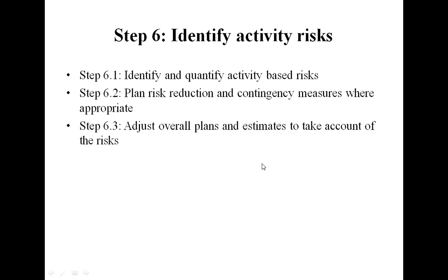Step 6, identify activity risk. So here, first, identify and quantify activity-based risk. Here, the damage if the risk occurs should be measured in time lost or money.